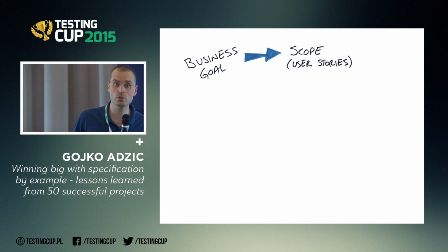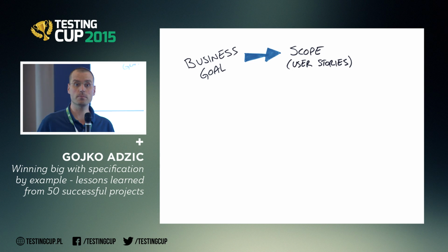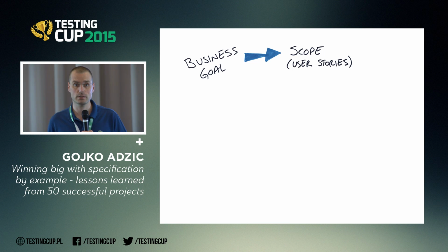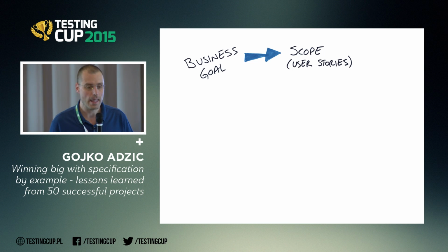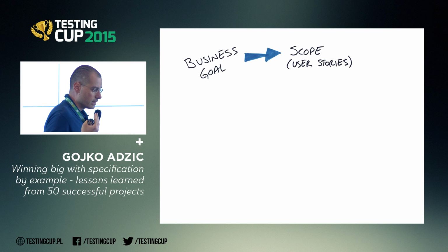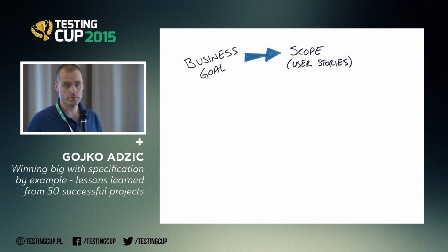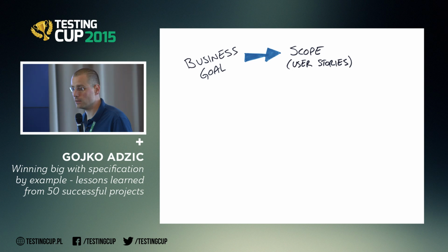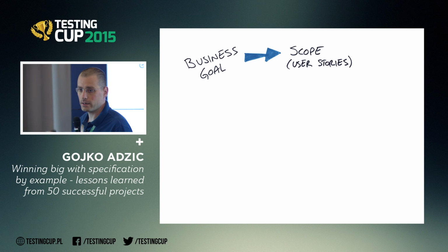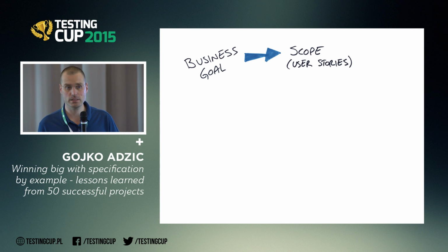So they applied the same approach by using use cases. They said, okay, we're going to use high-level use cases as scope, and then just before it comes to the implementation, we'll translate those things into something that's a lot more detailed, because that's when we need the details. So the other interesting thing that clearly separates teams that have successful implementation of BDD, spec by example, ATDD from those that just waste time is who then translates this scope into a much more detailed specification.